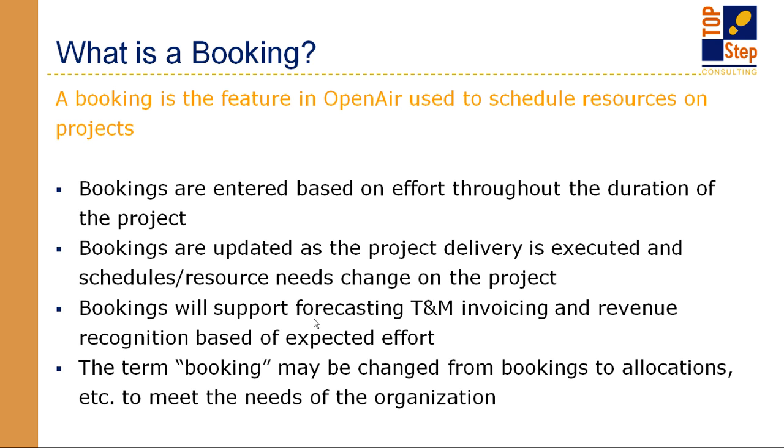It will be important to define that process and the timing you want to perform that process. So let's say you want to tell all of your project managers or your resource manager to make any updates to their bookings by Monday at 10 a.m. So if you pull reports, you know that it's the most recent, right? You know what your process is. You know when to pull those reports. Or if you're scheduling reports to come to you, you may want to pull them all on Tuesday, something of that nature. So it's important to understand your data maintenance process.